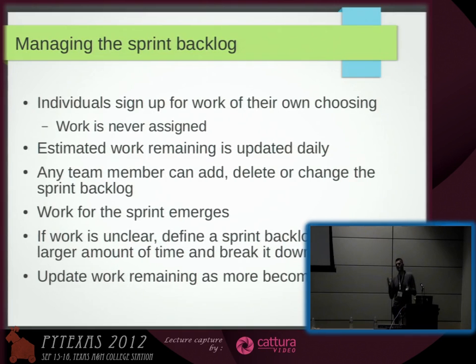And one interesting thing that people tend to evade is that they do it 90%, and then they say, okay, let's just accept it. And then you have this thing that's very common in software engineering projects, that 90% of the features of the software are 90% done, which pretty much means nothing is done. But basically, that is the ideal world. So even if you get to that 90% and you hit the end of the sprint, you don't call it a failure, but you do not accept that work.